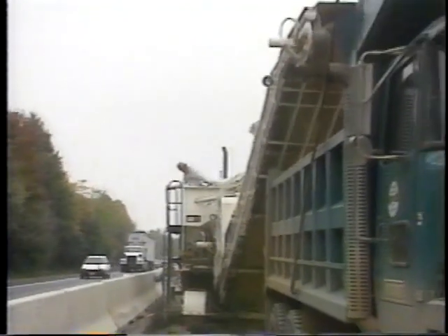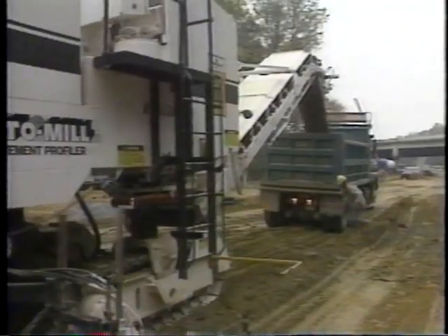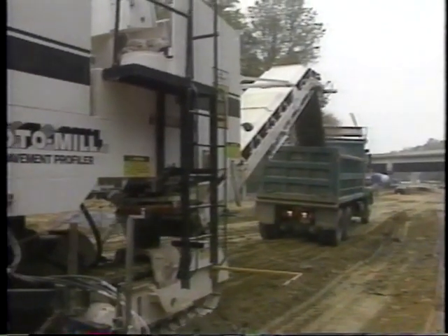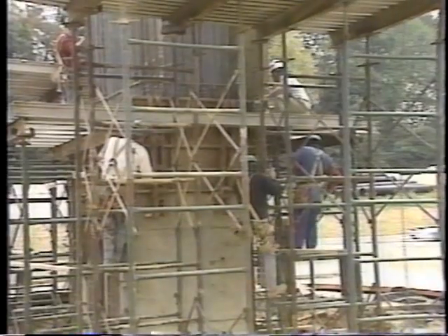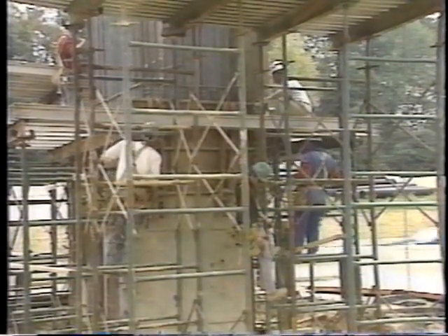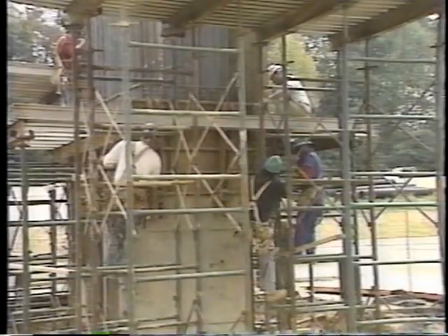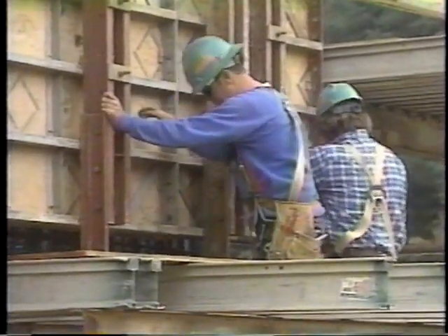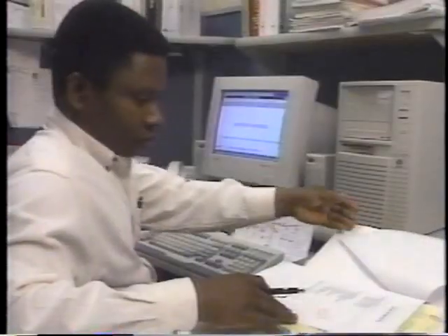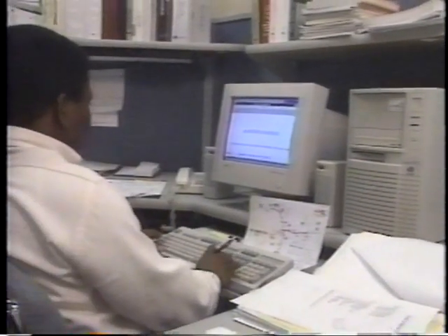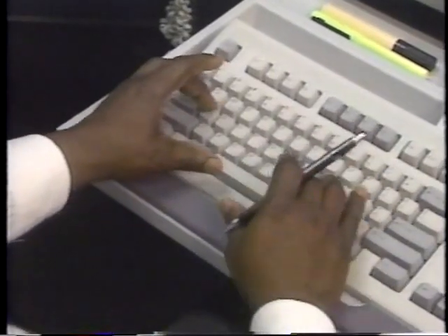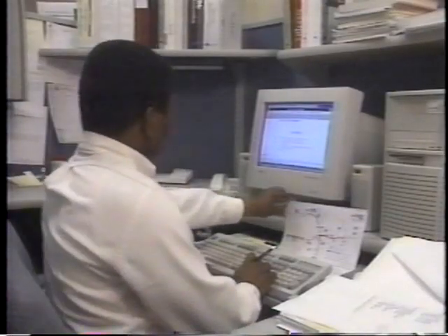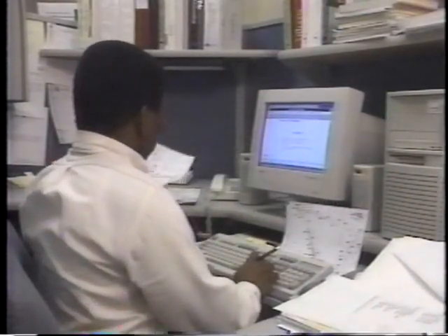The actual man-hours used may be reported by individual planning activity. Alternatives include reporting by planning activities, staffing activities, or one activity per contract. The use of planning activities provides more detailed information, but requires more effort than the other methods.